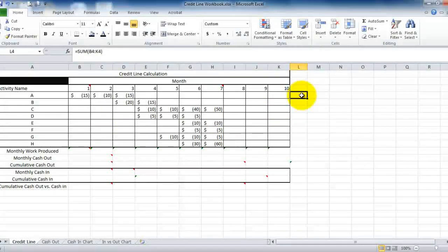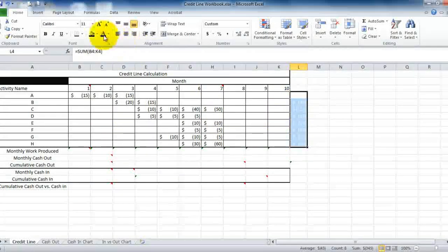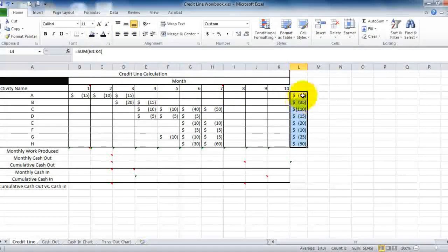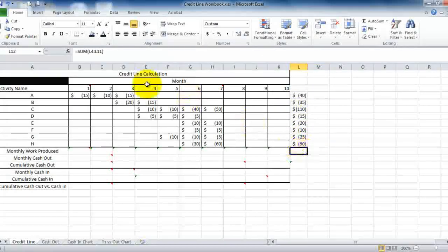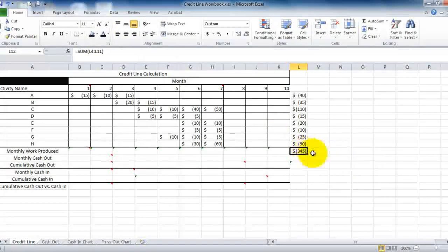If you wanted to know how much each activity was going to cost total, you could come over here and insert a formula which would tell you for each activity what it's worth. Just as a double check, I'll insert a cell here that tells me that our total project cost is $345,000.